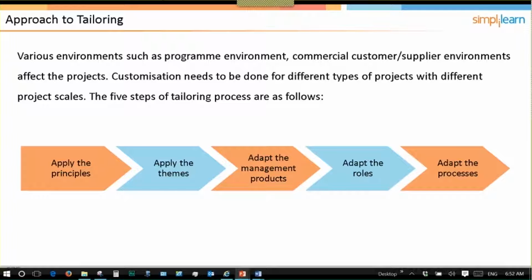Yeah, if we've agreed we're going to use PRINCE2, the role that would be ensuring that we're using the methodology would be the project assurance role within the project. And again, that defaults to the project board. And if the board can't do it, they would delegate it to someone else, but it can't be delegated to the project manager or any other direct reports. So if the board delegates that responsibility, they would have to delegate it to a different person. So that's a probable role that you might have differently. The quality assurance is outside the team, but they would also be making sure that you're applying PRINCE2 if that is embedded in your organization. Does that fully answer the question?